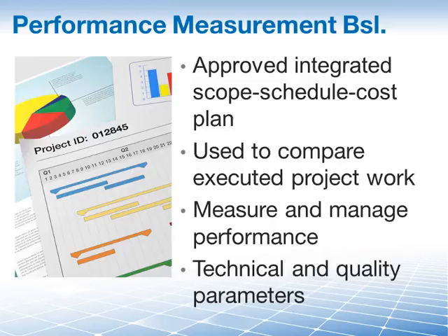In regards to the PMP exam, you must remember that the performance measurement baseline is used in connection with earned value. For instance, when we talk about the numbers behind earned value and we say that it is $100,000, then that is information that is relating back to the performance measurement baseline. This means really that earned value numbers can never be bigger than what you find in the PMB.